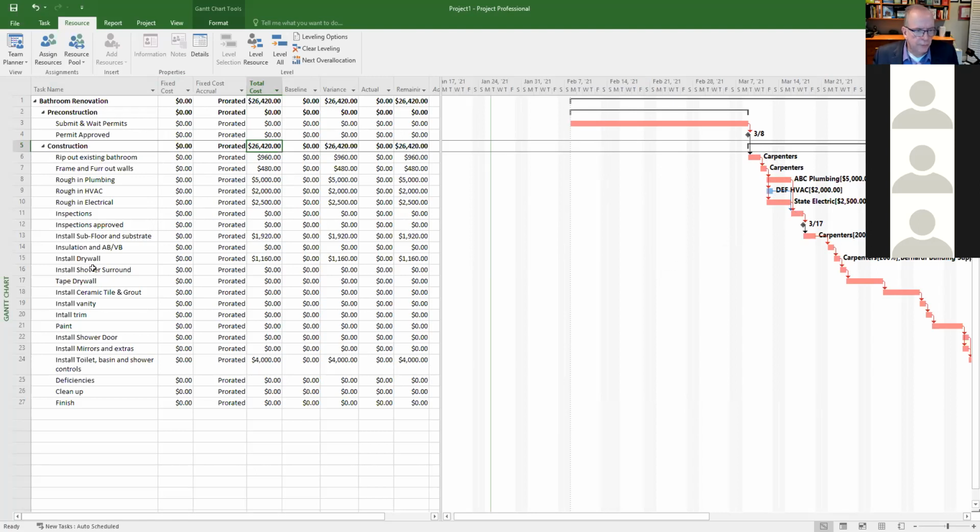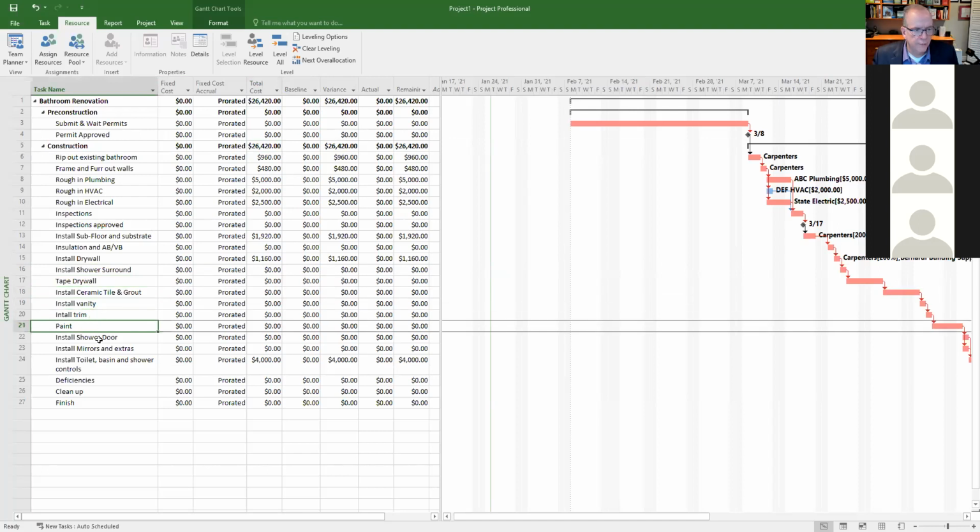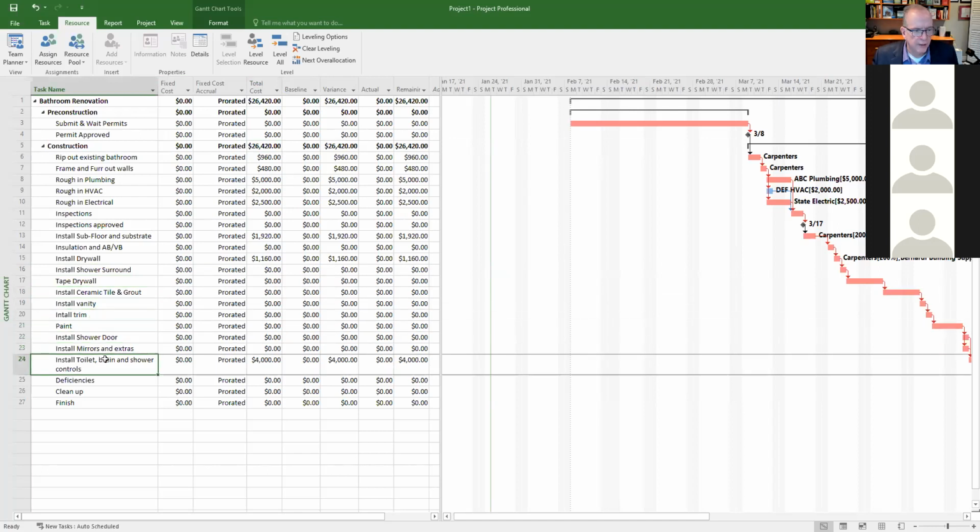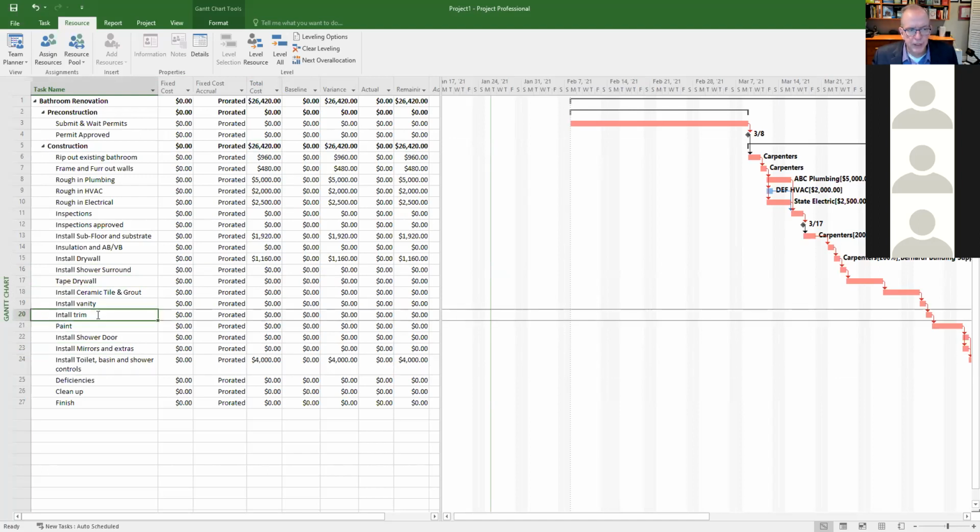So of course, I would have to put in all these other costs that I budgeted for on this project. I'm not going to be putting in all the details of the trim. I'm just going to be putting in the labor for the trim, and I may then add at some point somewhere, like a bulk delivery cost that's representing all of the trim materials, that sort of thing.